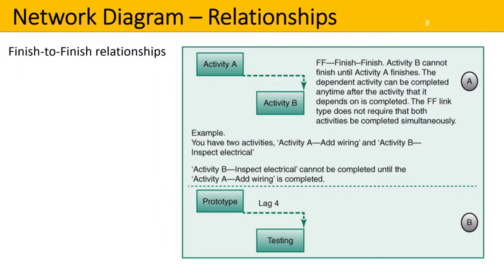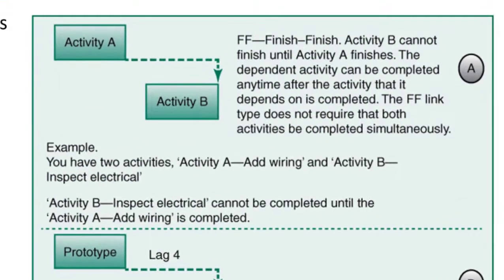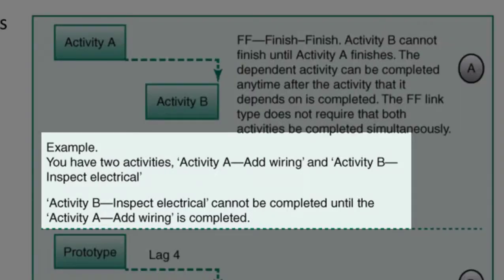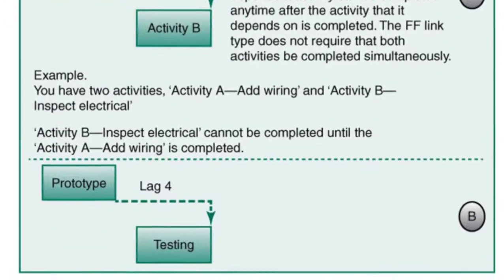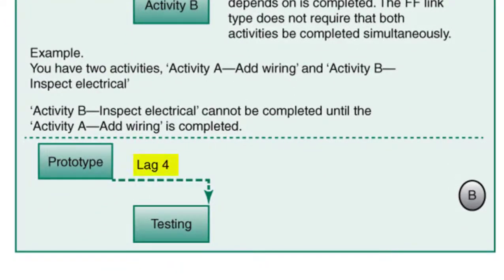Finish-to-finish relationships: at the top A, activity B cannot finish until activity A finishes. The dependent activity must be completed any time after the activity that it depends on is completed. The finish-to-finish link type does not require that both activities be completed simultaneously. For example, activity A is add wiring and activity B is inspect electrical — activity B cannot be completed until activity A is completed. For B, we have a lag of four days between prototype and testing in a finish-to-finish relationship.